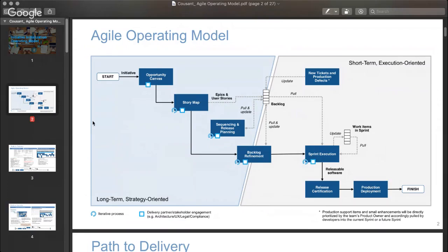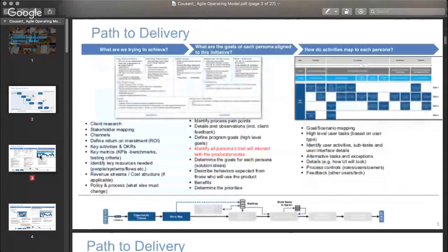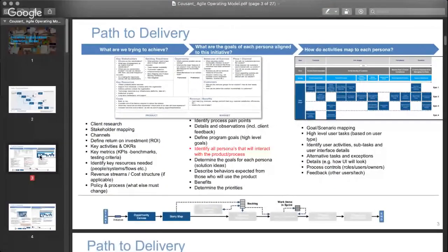The next thing from there then would be for you to create some kind of a story map. And all a story map is, you're mapping the scenario that you have: allow customers the ability to change details about themselves online without the need of anybody else. That's your high level goal. You need to break that into some kind of user tasks, into some kind of mapping. So what will be the user activity, right? They will need to go onto the phone or their laptop, click onto something. So that's a user activity.